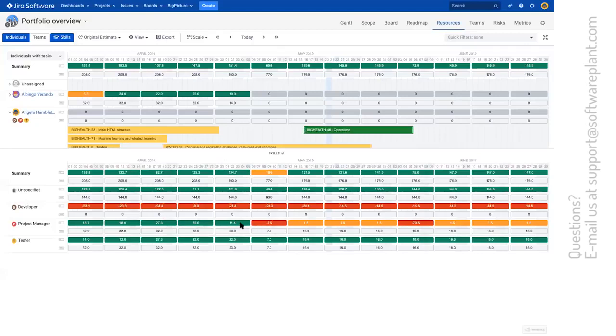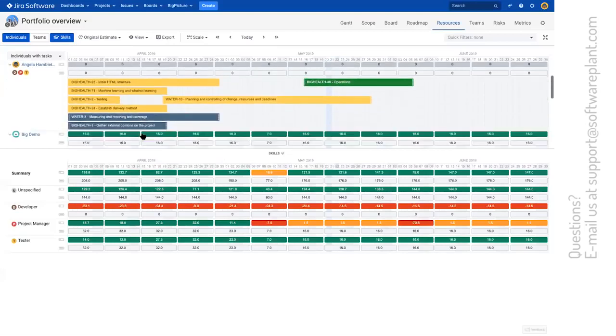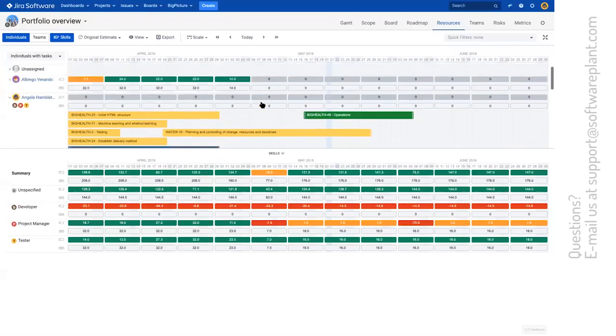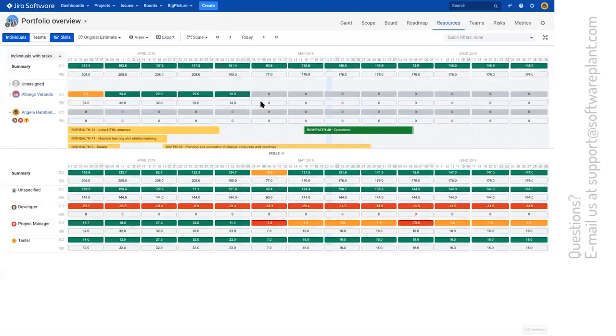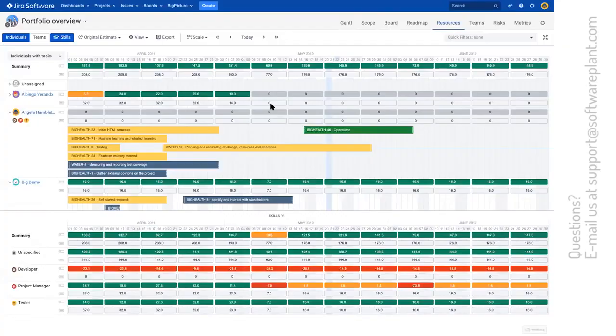Which in turn adds the required availability of a project manager here at the bottom. And this is where these numbers come from. So we are missing seven and a half hours of a project manager in this week. And 70 in this week. So we have to redistribute our work. So that skill-based planning tells us everything is in good place.